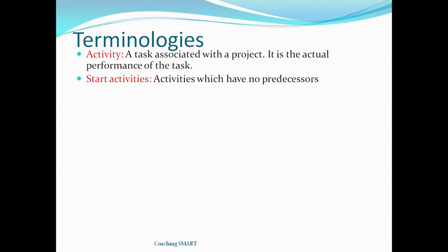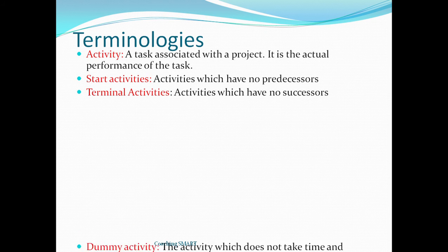Start activities. Activity which have no predecessor. So when you talk about start activity, it is an activity which has no predecessor. Terminal activities. Activities which have no successors. So at the end of the project, we have activities. So activities which have no successors are called terminal activities.